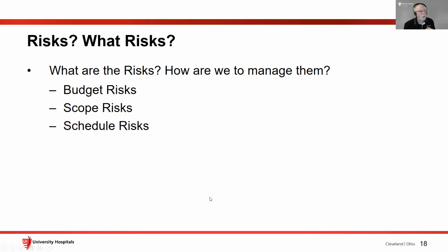Okay, schedule risks. It's Cleveland. Welcome to Cleveland, where if you don't like the weather, wait 10 minutes. It could snow at any time, including June. So we're never quite sure what that's going to bring for us. So that can cause some delays in scheduling, in executing the schedule, especially during the construction period. Once the building is enclosed, everybody breathes easier because now the weather isn't nearly as much of a factor.